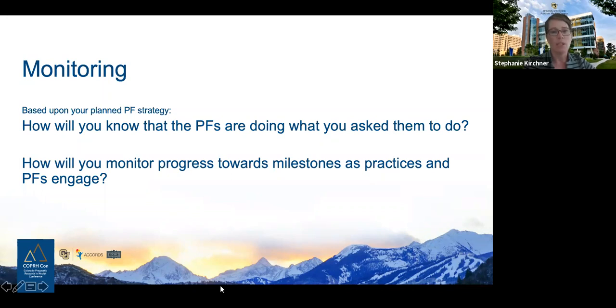So typically, what we do to track and monitor what's happening across multiple practices at one time is we ask for monthly field notes, which again, we pitch as a tool to support practice facilitation so that they can use it to look back. What did I do with this practice last time? What are we doing next time? But it's also a great resource for qualitative evaluation of programs at the end.